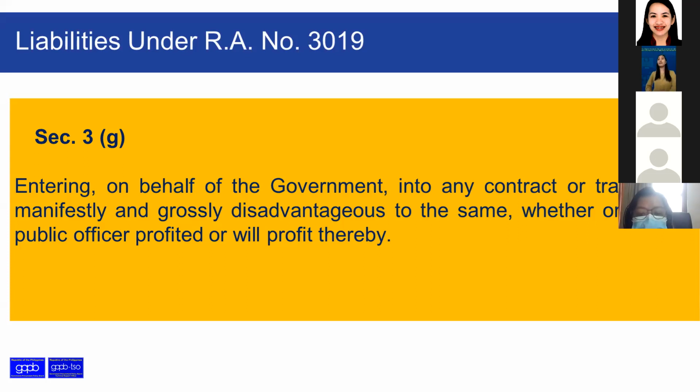Tapos hindi mo alam na yung 960 pala, 1,000 pala yung sa market, sila pala yung pinakamahal. Kasi yung market analysis, yung ABC nyo, nag-range yan between sa pinakamahal at pinakamura. Kayo yung magde-determine ng reasonable. Nasa inyo yan. Kayo, umasa lang kayo sa binigay ni end user na market analysis na yan.